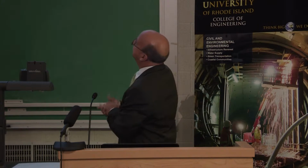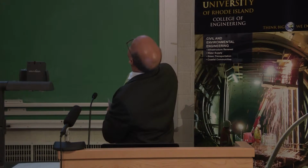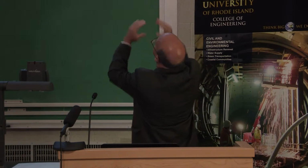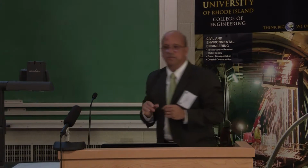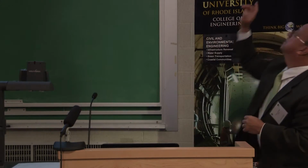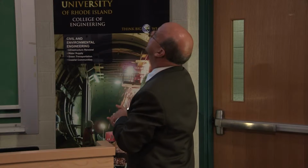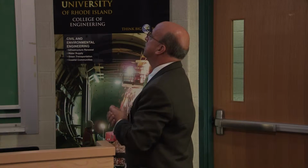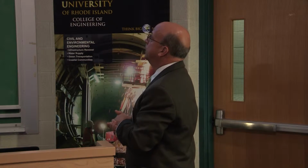Here's a little plan view. As you can see, on pier number 7 there, we used 153 H piles compared to simply 10 pipe piles for piers 4, 5, and 6. If you take a look at the layout of the pipe piles, each end of the pier is like a domino, with the 5 number. The center pile, the dark one here, was what we call the pilot pile. And that was the one that was used to determine where we reach capacity.